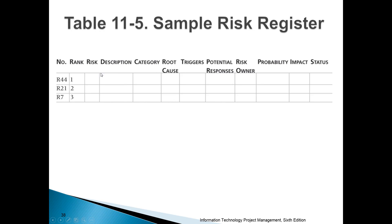All in all, a risk register can look like a table where you have IDs for each risk, then rank, risk name, description, category, root cause, triggers, potential responses, risk owners, probability, impact, and status of each risk listed.